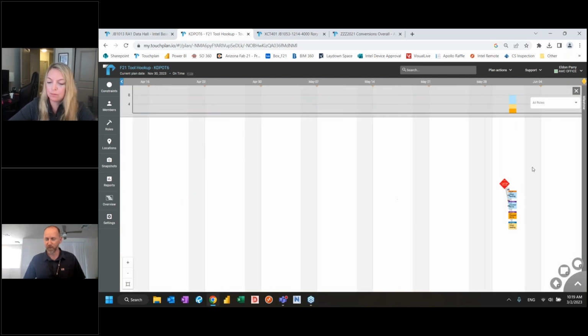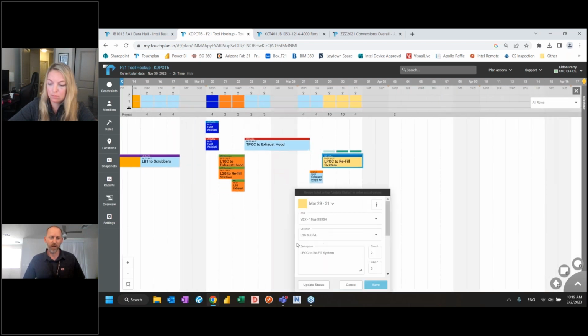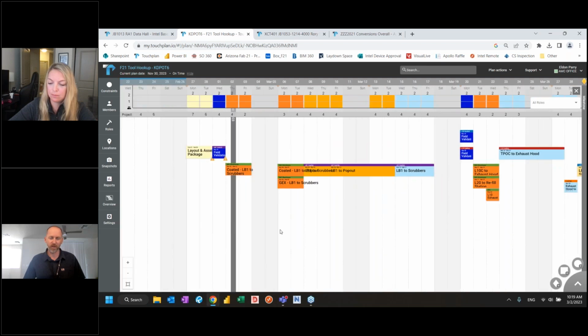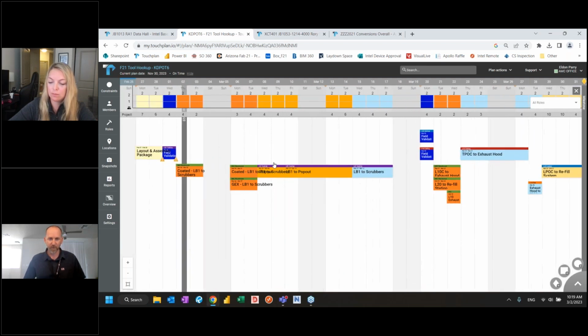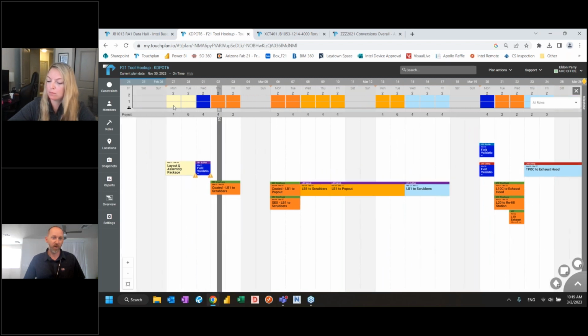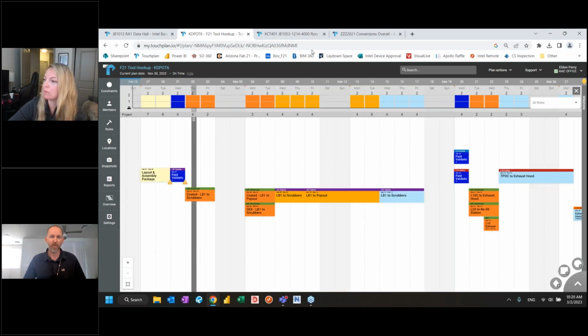And I have some items way out here. Red is client milestone items. I don't know if I remember. Oh, yeah, that's right. The light brown is our volatile organic exhaust type work. Pretty basic. You can see it is manpower loaded. It shows that two guys are operating each one of these items. This is a sequential pattern that we use. In this case, these same two guys are performing this function throughout. That's how we operate this.